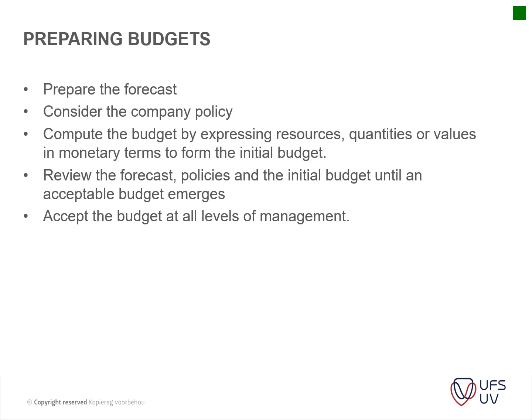So preparing your budgets: prepare the forecast that we've done, consider the company policy, compute the budget by expressing resources, quantities, or values in monetary terms to form an initial budget, and then review the forecast policies and the initial budget until an acceptable budget emerges. Then accept the budget at all levels of management. So we've dealt with that, where it has to be signed off.